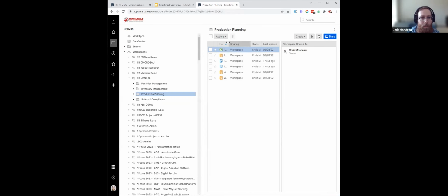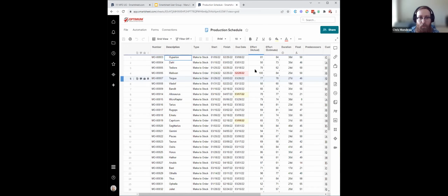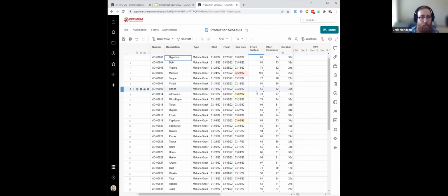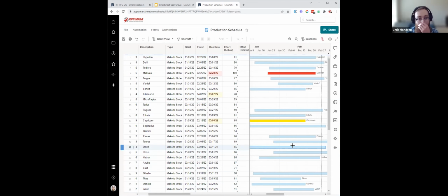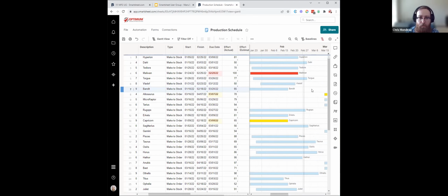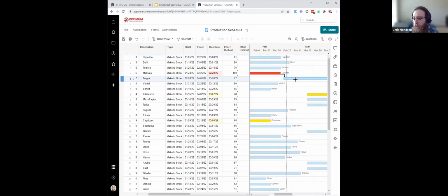And these ones are a little more finicky for on the fly kind of build outs, but within the schedule, you can set those dependencies of these tasks. So I'm just inside of my flat grid view for my production schedule. But if I wanted to switch over to view the actual production timeline, I can switch over from here and then manage that. So we'll start first with just a batch to batch, not necessarily from department to department. But if you wanted to run that sequence, you can actually schedule the dependencies inside that Gantt view itself to say this batch has to finish before the next. And it's just kind of a normal sequence of a start to finish. You can offload these with some lagging or leading times in this.